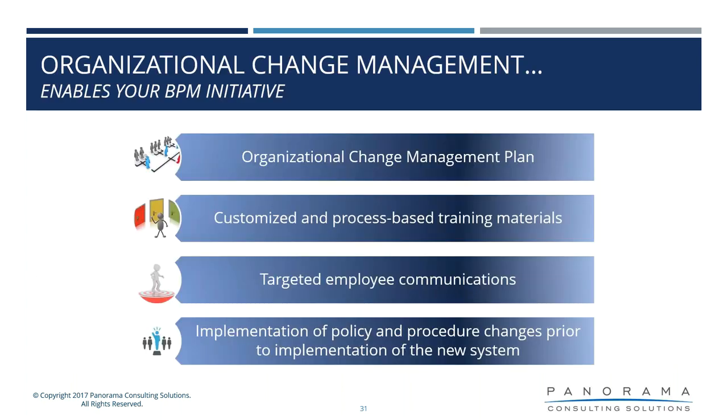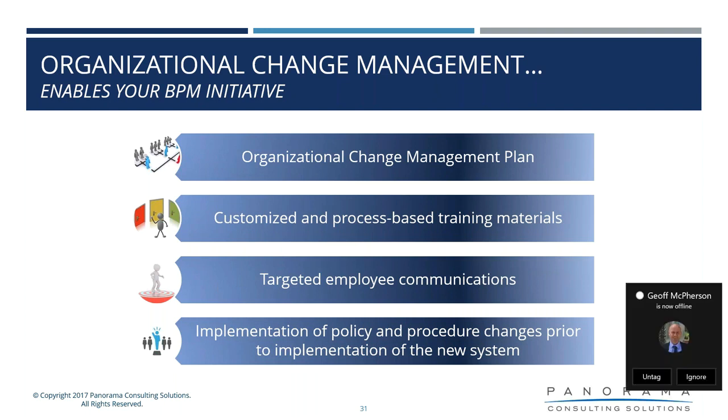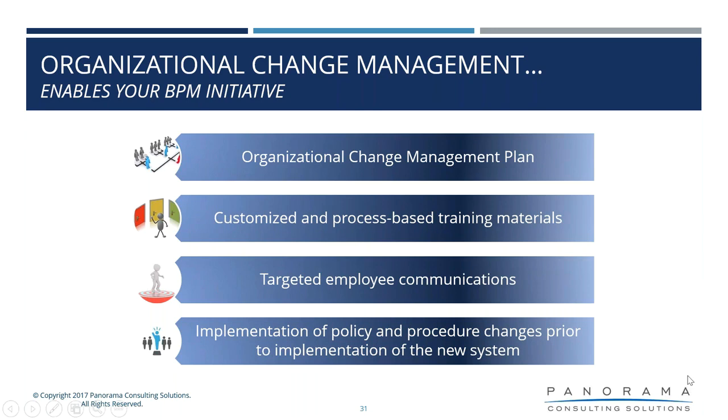So lastly, make sure that you have an organizational change management plan that includes elements such as communication, sponsor leadership, executive buy-in, training, as well as coaching and resistance management. Make sure that you've customized and process-based your training materials, so it's not just about the technology. Make sure that you're educating on what the process changes are, targeted employee communications. Make sure that you have a good segmented plan, that you're delivering the right communications to the right stakeholders at the right time, and that you have an implementation of policy and procedure changes prior to the implementation of your new system.